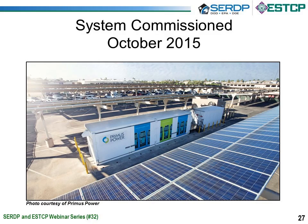So roughly about October 2015 is when the system was fully commissioned. We had the interconnect agreement all approved. San Diego Gas and Electric came out, installed their meter, and gave us our permit to operate. Primus went through their initial checkout because once the system's delivered, they had to bring all the energy cells online, make sure their environmental control system was working, and all the safety systems inside the pod were working. All of that was completed around the fall of 2015.